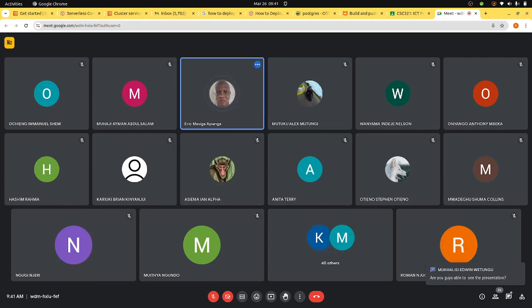Then the technical team, the project team at the planning phase, now remember, I've told you we'll do planning, will look at the requirements and start seeing what each component is going to cost. Then they'll have the total cost, which this project management team is going to present to the university management board.